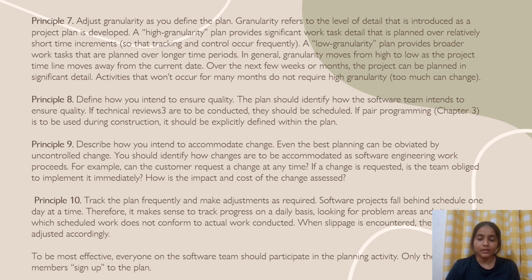In general, granularity moves from high to low as the project timeline moves away from the current time. Over the next few weeks or a month, the project can be planned in significant detail. Activities that won't occur for many months do not require high granularity.